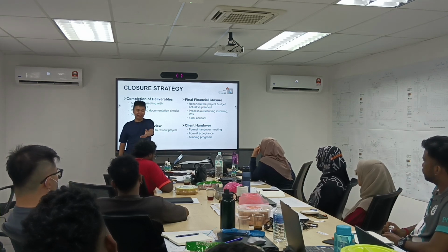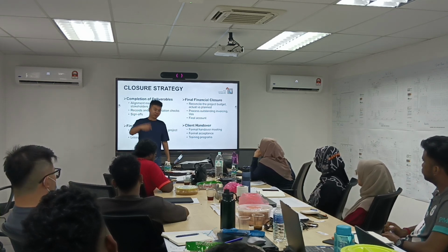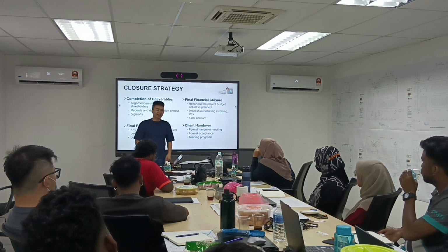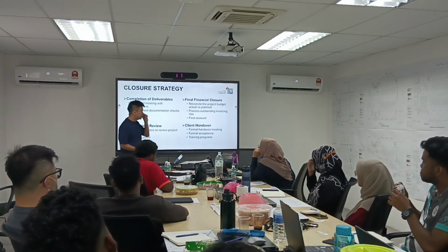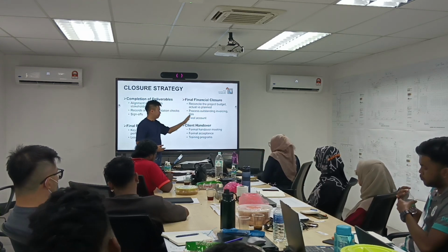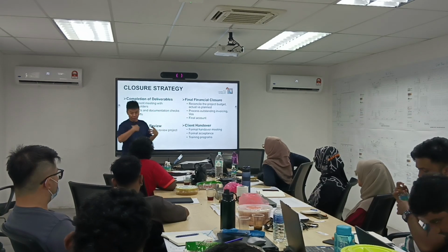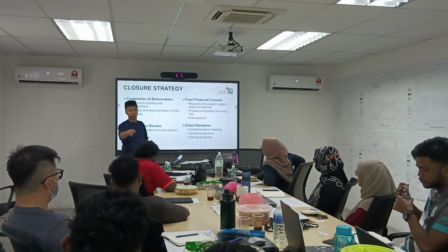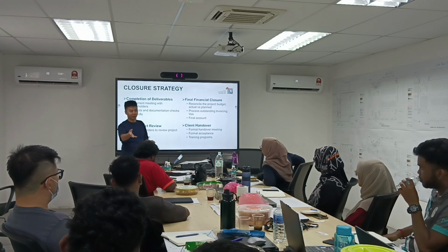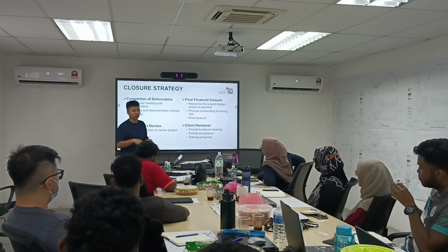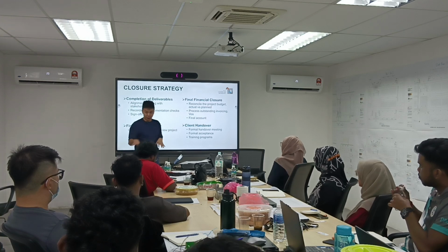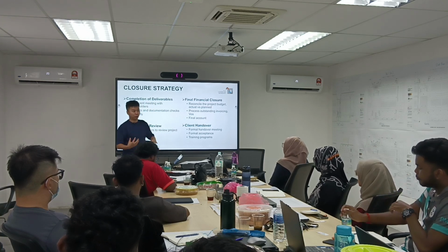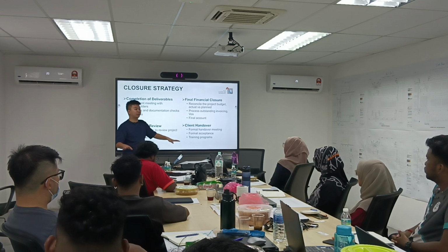So again, come back to the same case like the court. I go and tell the judge, right? I say, you think it makes sense or not? Doesn't make sense, man. So what I normally practice here is that the moment I sense there's a VO trigger, when you guys issue all these things, I will already be in contact with the contractors, asking them to give me quotation. That's what I do lah. But however, until the end of the project, there must be something still left open.